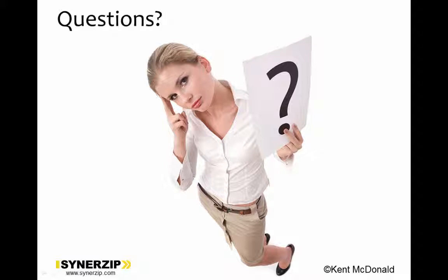So you say, what's the most common scenario? We're going to satisfy that one first, and then break off the other scenarios that maybe aren't as common and deliver those later on. We might find that we don't need to address those at all, because they happen so infrequently that it makes more sense to treat them as exception handling.